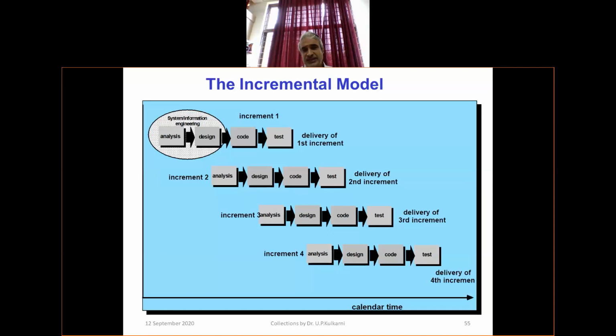Now we are doing an incremental model. I decide to go for the incremental model. The reason is, you say that this project is 1,000 crores spread over 10 years, right? But your budget for this time is only 10 crores. So though the entire product is given to me, the condition is that I develop a part of this, and having developed this successfully, we accept it because you are new to me.